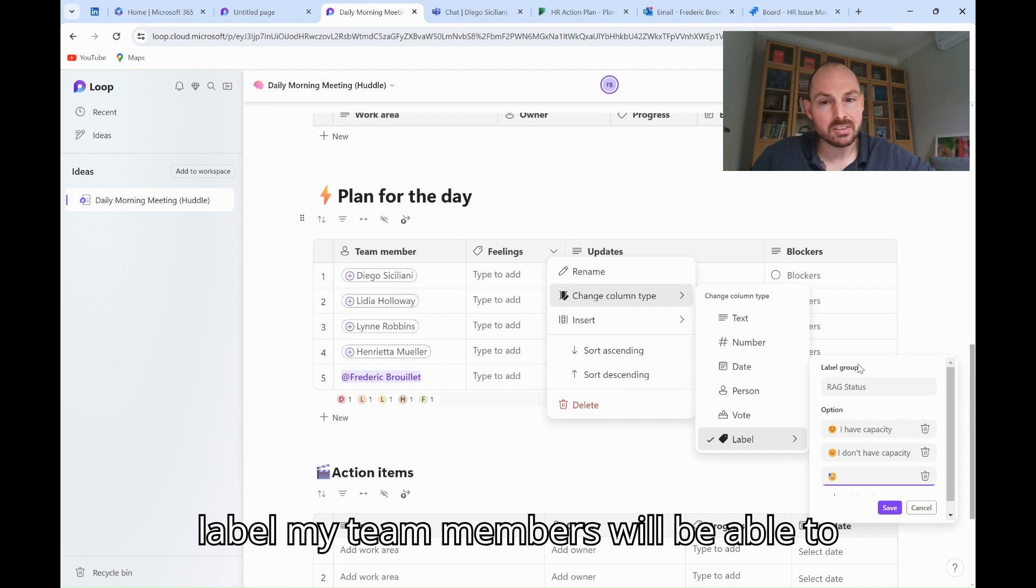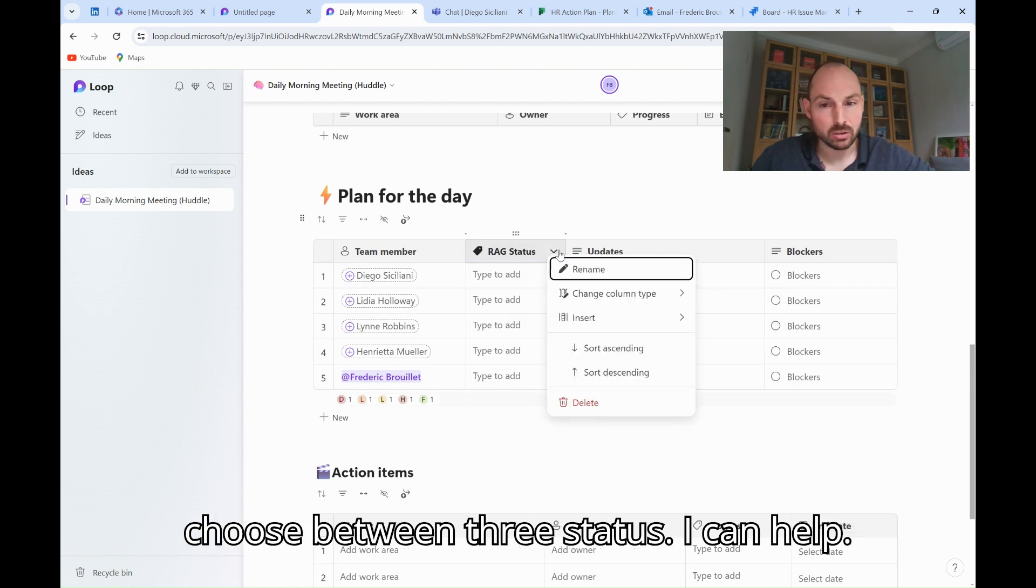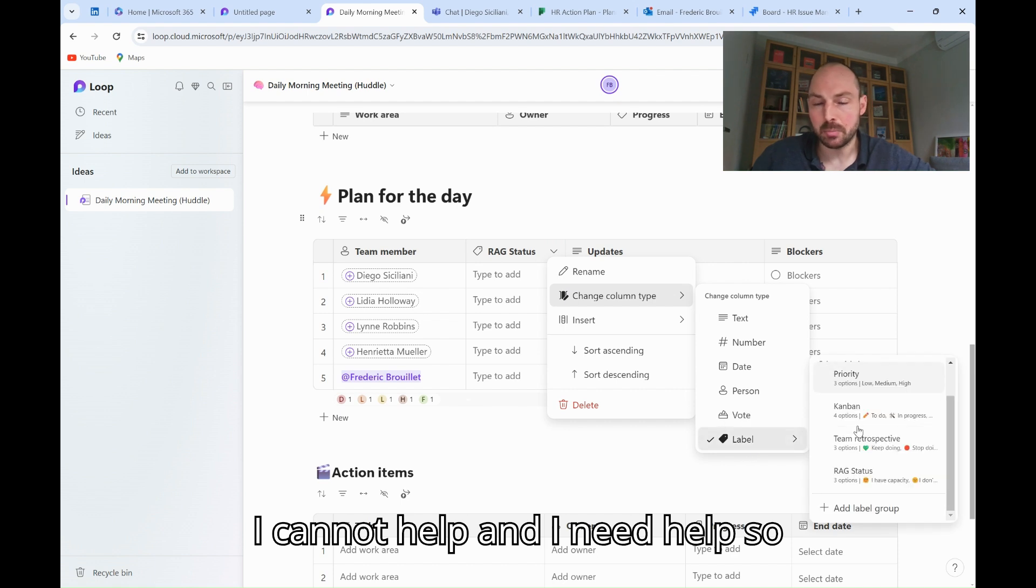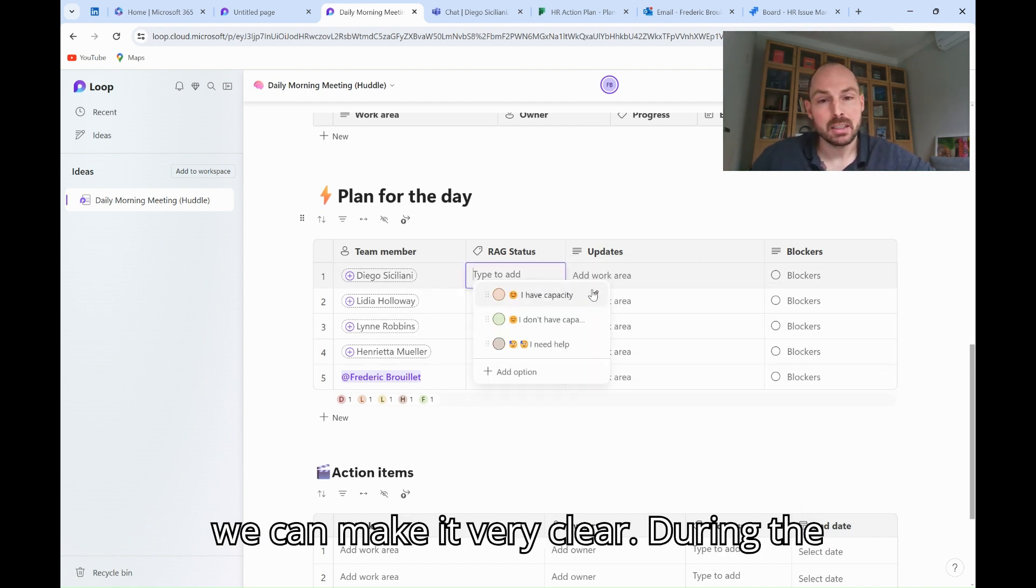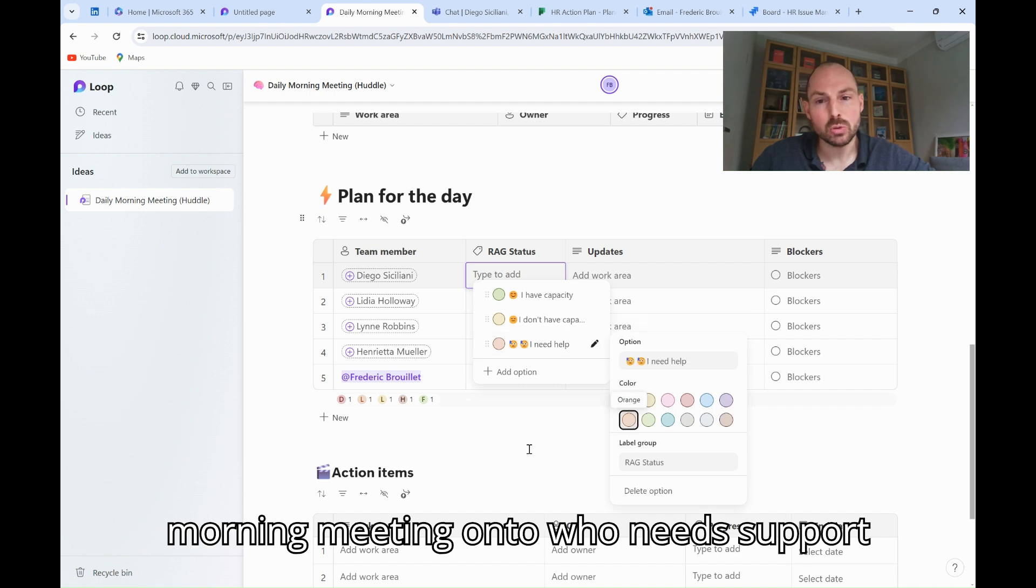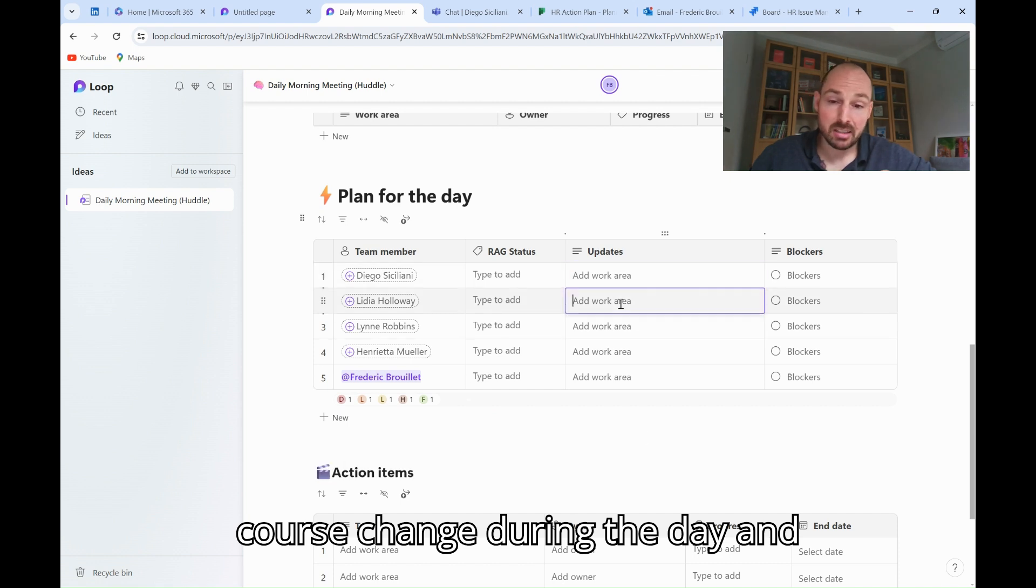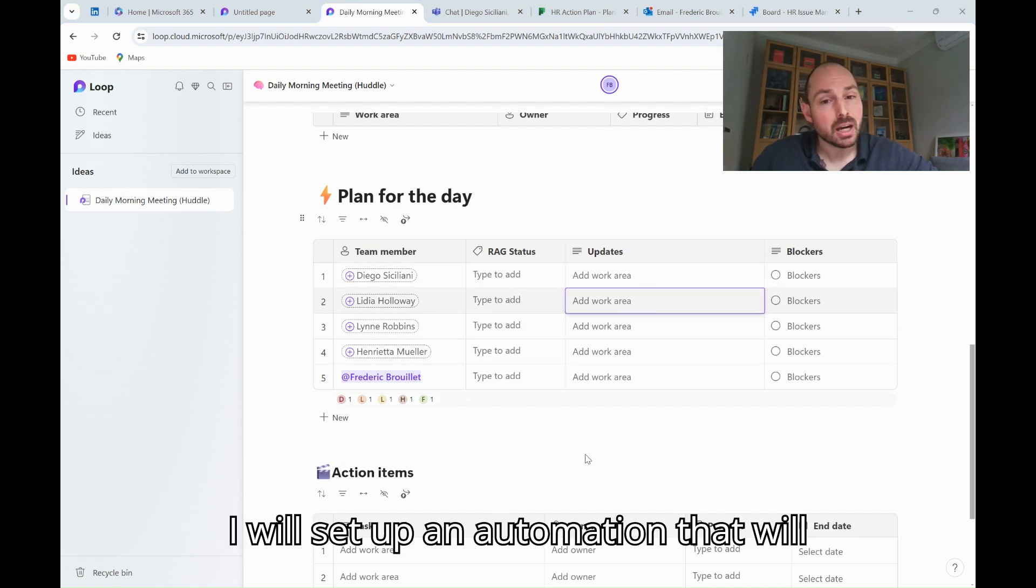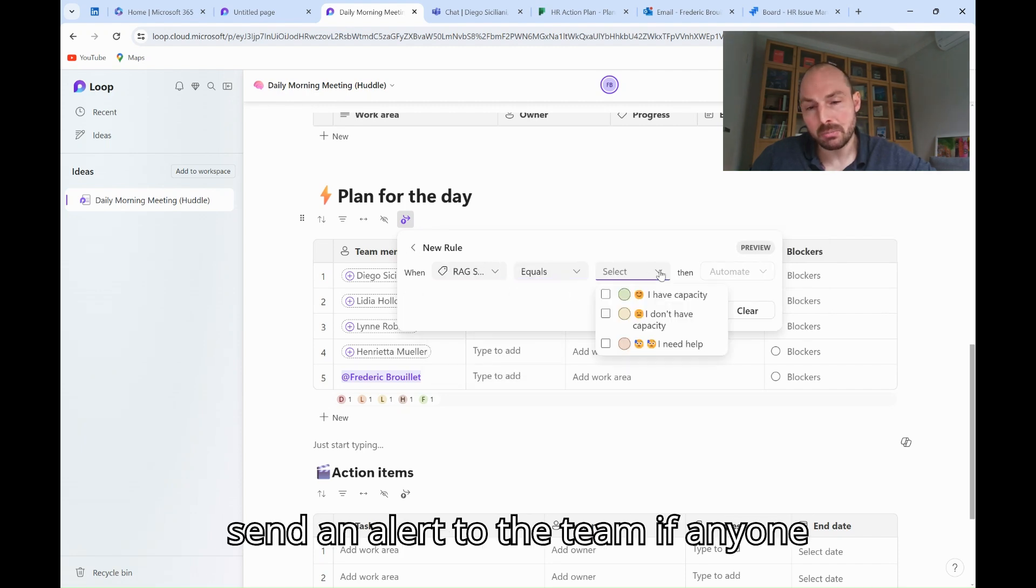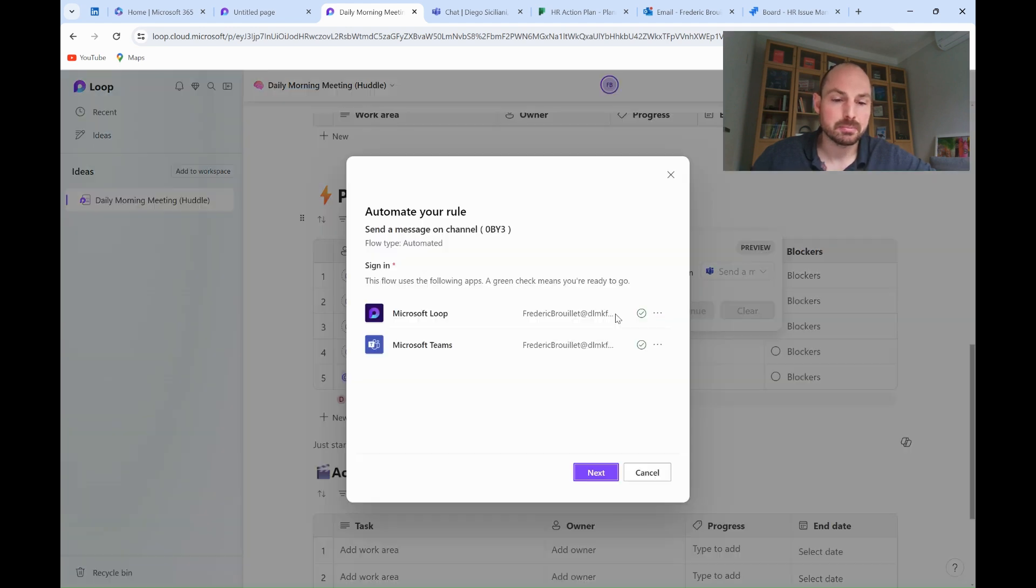In this label, my team members will be able to choose between three statuses: I can help, I cannot help, and I need help. So, we can make it very clear during the morning meeting who needs support during the day. This Rack status can, of course, change during the day, and therefore, directly within Microsoft Loop, I will set up an automation that will send an alert to the team if anyone changes his status during the day into I need help.